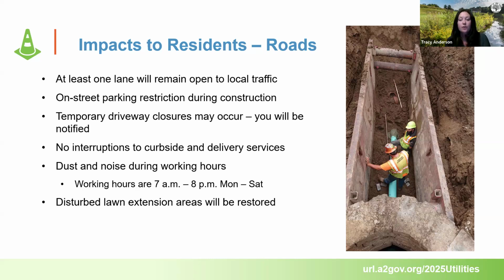If the construction crew is in front of your driveway for more than like an hour, they will tell you that you won't be able to access your driveway for the next day. They'll notify you the day before at least. Everything, all the curbside garbage, trash, recycling, Amazon deliveries, mail, and emergency services, there will be no interruptions to those.